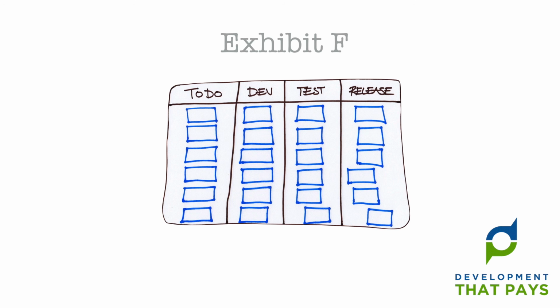There's so much I could say about this board, but let's keep it really simple. There's far too much work in progress. There'll be context switching happening all over the place. Work is moving through this system at a crawl. Basically, there's just no Agile left.